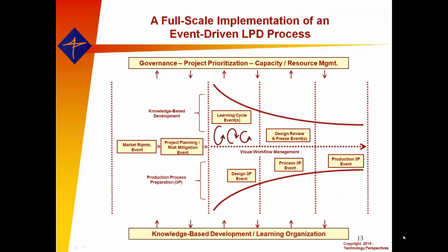The teams are more focused, with less distraction and less setup and changeover waste. We have that in product development. It's called switching costs. All of those things are minimized. If you instead have vastly more projects than are realistic for the number of people you have with the skills required, batching takes place. The lowest priority thing they're working on is slowing down the most important project in your firm. So then we go into the